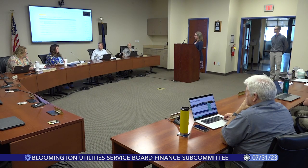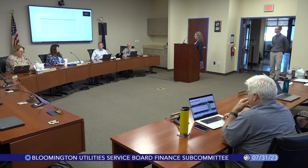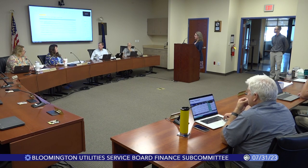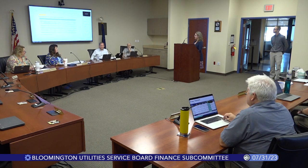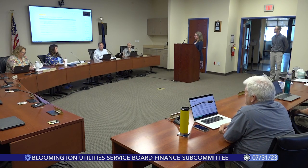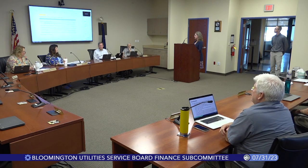the university have had a lot of the same issues. We've had projects, a large one that we sent out for bids a couple of years ago. It was so high, we just stopped and waited a couple of years, and the price came down 20 million. So that's not so bad. So things are leveling off, and this is an estimate; we might see more favorable bids when we put it out for bids, or one way or the other, I guess. Depends on what all we want to include. But we've seen the same kind of thing, Vic.